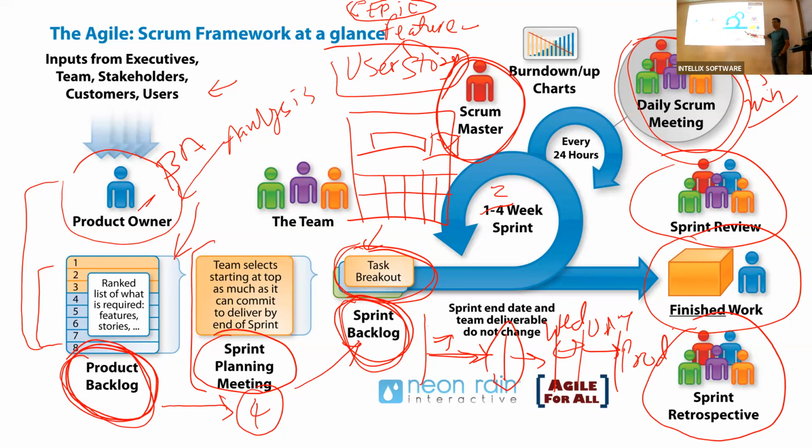Well, no, it's a team. The whole idea here is that the team is doing the work, running themselves. Nobody else is managing it. So that's how it works. If you are done early, then you are bad at your estimation, so next time you take in more work because you were overestimating. Tell them I finished already.